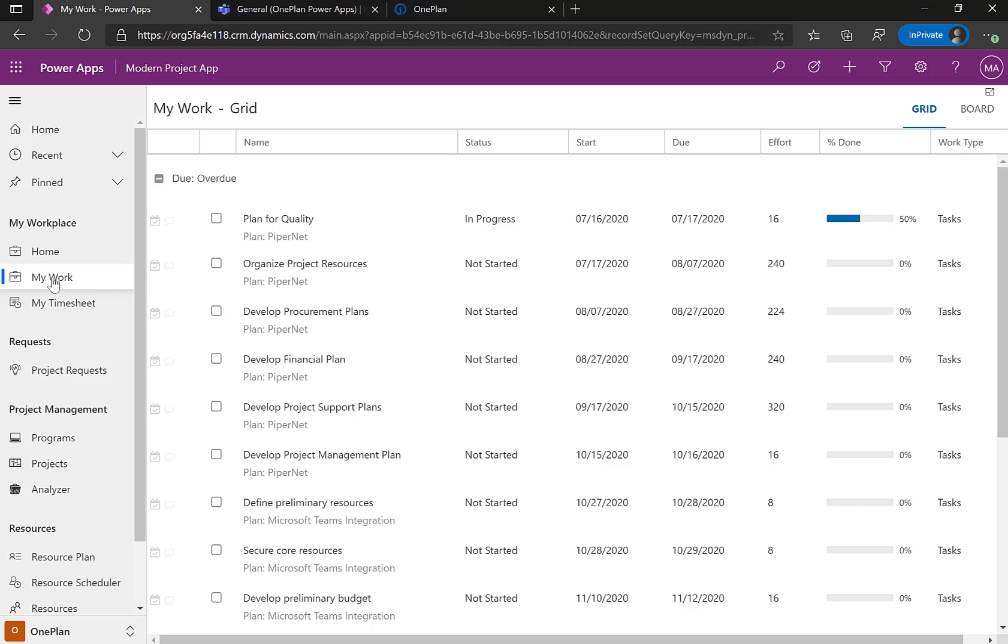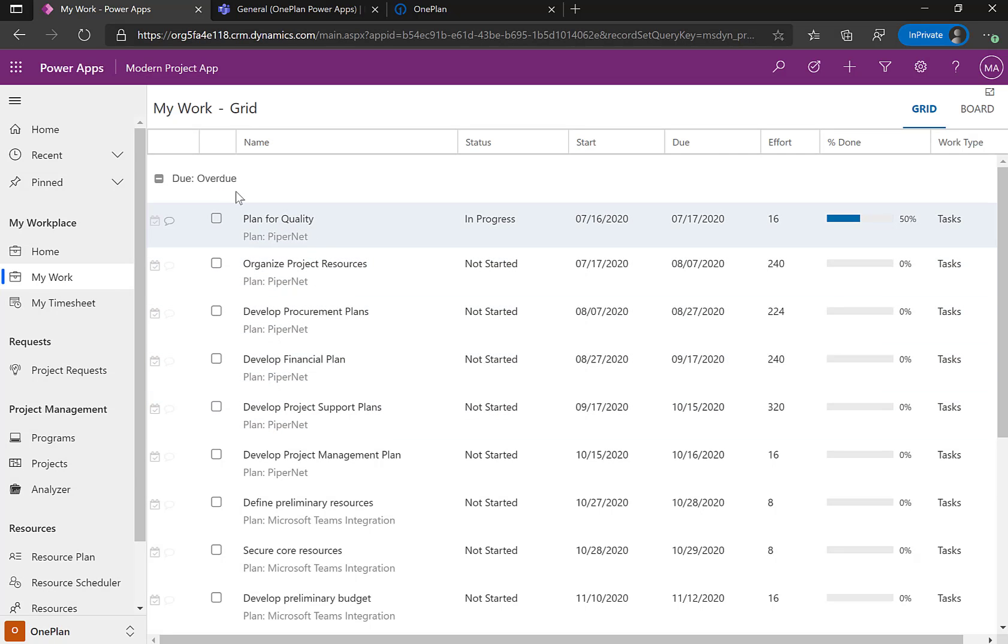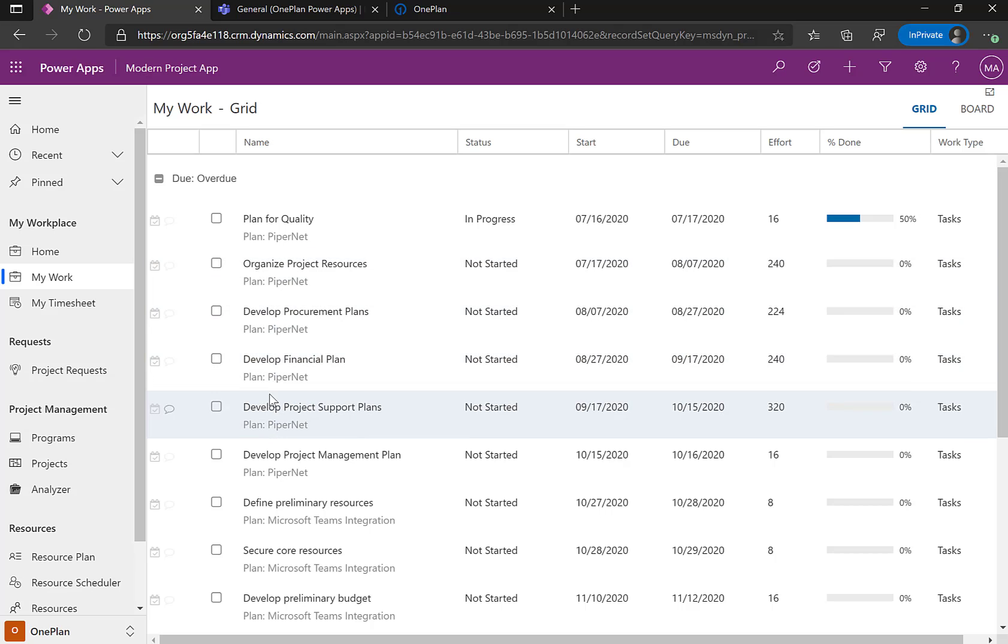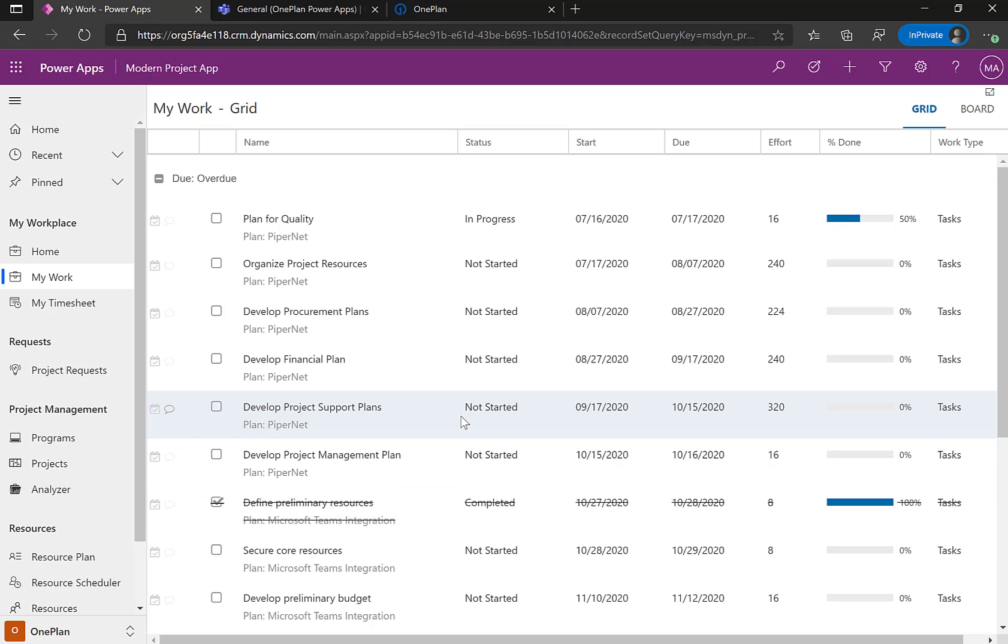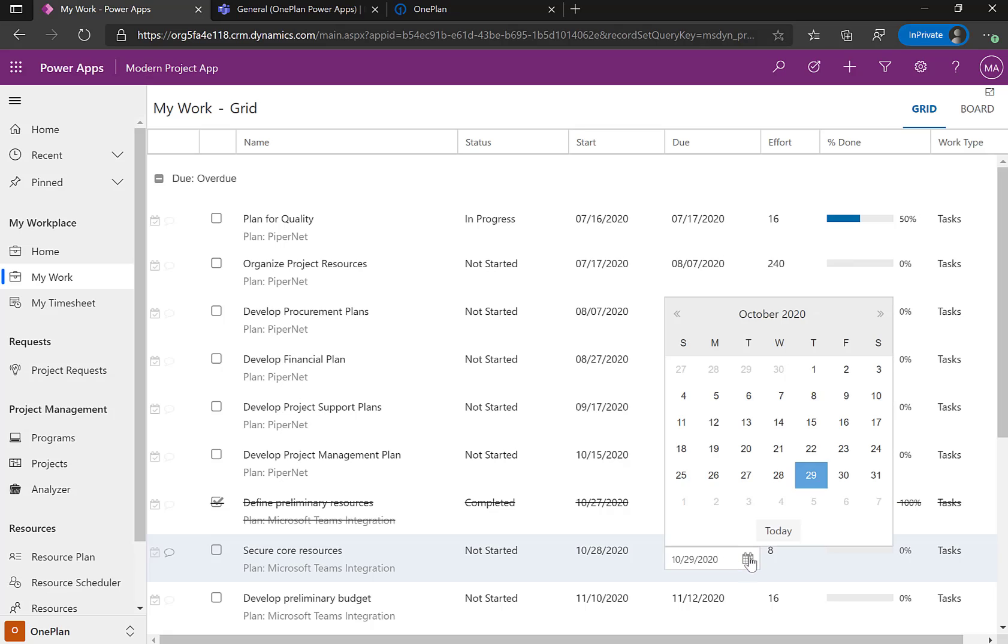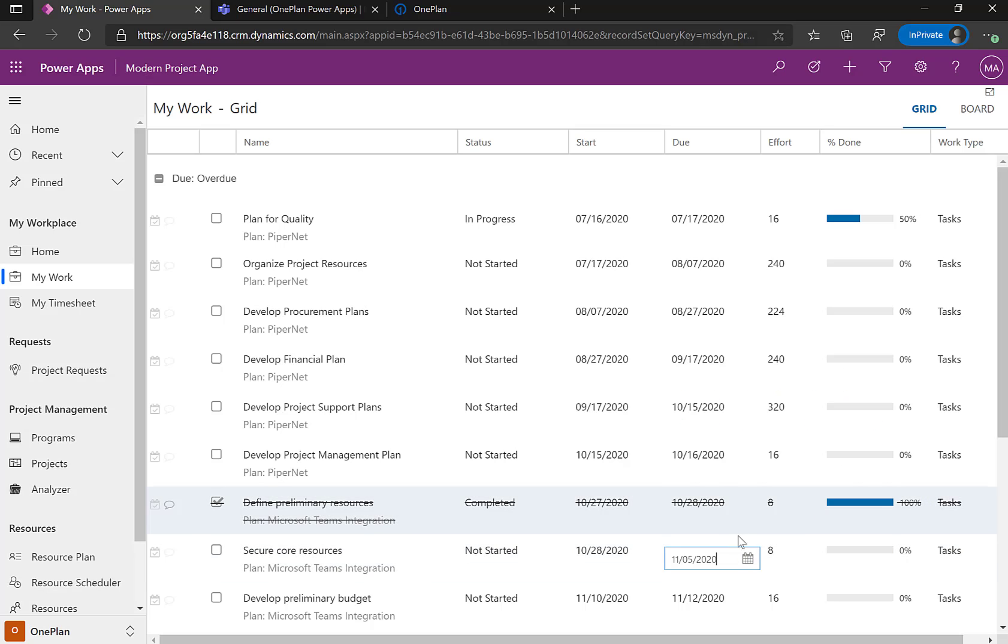And so as a team member, team members can log in and see what work is assigned to them, when it's due, and they can actually provide status back. So for example, you'll see here's a task to define preliminary resources and that's for my Microsoft Teams integration project that was due back in October. So I'm going to say that particular task is now complete. I can see another one underneath there. It says to secure core resources and that is due the 29th. And I'm going to say, well, that's actually going to be a little late. So we're going to move that to the fifth. So now it's going to be completed on the fifth.